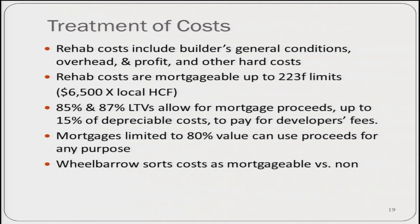But here's the question: what happens if it's an affiliated general contractor? Are we still going to allow a profit? And I think in this case we are not laying down a hard and fast rule, but certainly the designated underwriter needs to be aware that it would be possible to have excessive compensation to the sponsor if we permitted, say, a 10 or 15% profit on the rehab cost, as well as a 15% development fee on total depreciable cost.